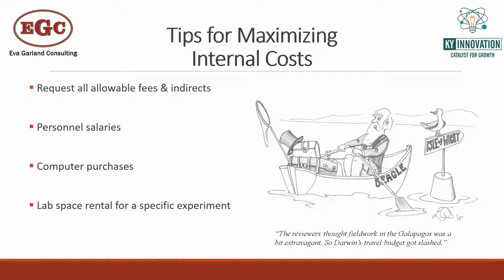Also, as I mentioned, lab space, you have the option of putting lab space as a direct cost, or just include that as your indirects. As you get more mature as a company, if you've got several grants that you're holding, it's going to be much easier to put lab space into an indirect, because it's supporting all the different projects and it's too hard to segregate by grant.